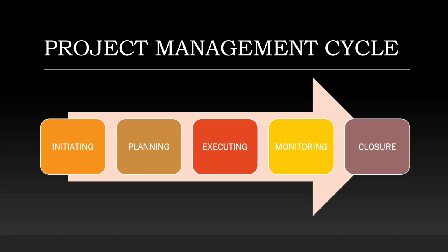What we also need to know about this cycle is that monitoring and evaluation is a different department within the project. It's a different skill set. It can be something very different. It can be differently funded as well. In most of the projects with the donors that I worked with, they want their own monitoring and evaluation person on board. So we make provision for such in the budget, but also in the project description, when you describe to them who is going to carry out what, and you indicate in the work plan as well.